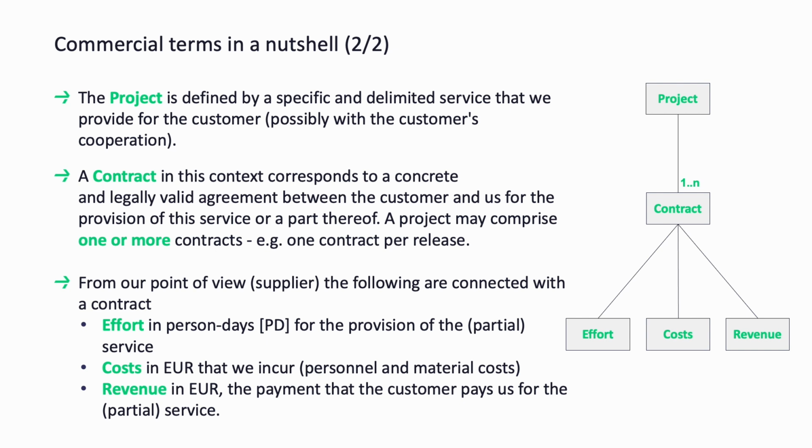An effort in person days, PD, that we have to invest with our team in order to provide the service or partial service. The costs that we incur in the process, which are both the personnel costs that belong to the effort, as well as any material costs for hardware, software, travel costs, expenses, etc., if applicable. And of course the revenues, that is the remuneration that the customer pays us in return. And of course we make a profit when the revenues are greater than the costs. So much for the commercial basics.